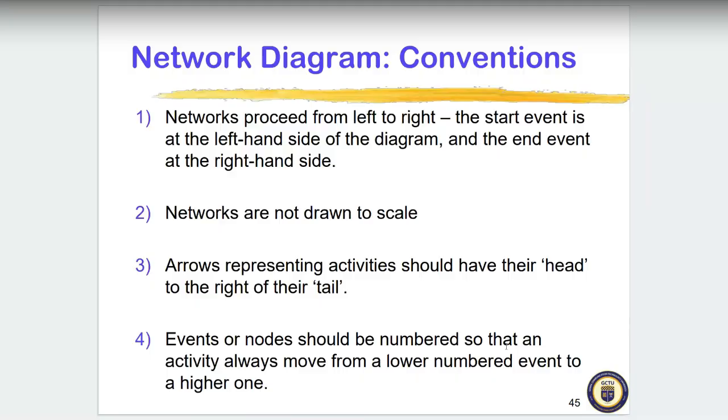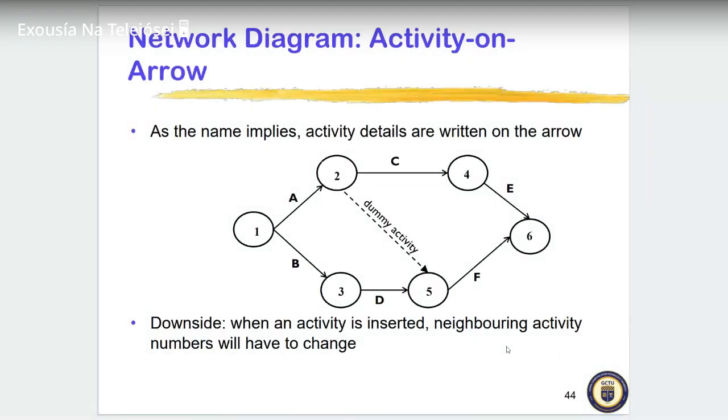See this? Can you see this arrow pointing to this particular event? This particular arrow is pointing to the same event. So this event has two arrows pointing to it. That is what it means. Even though we can share the same tail, we shouldn't have something like this. No two activities should be pointing to one event. If you look at this one, we have one arrow pointing right here. The reason why this one wasn't a dummy is that this is the end event.